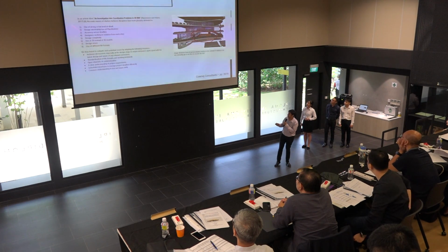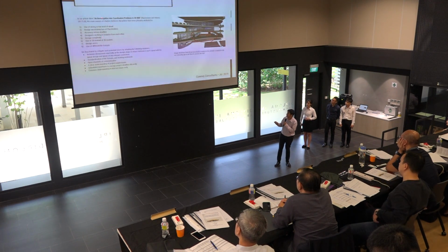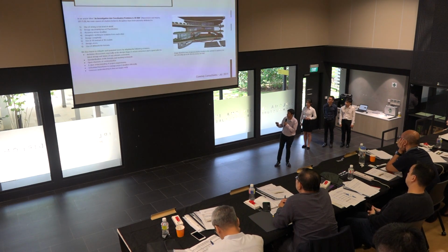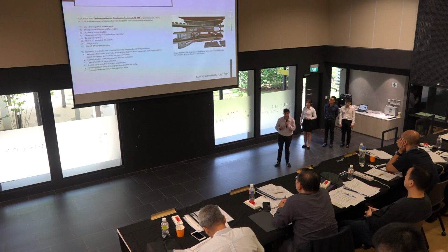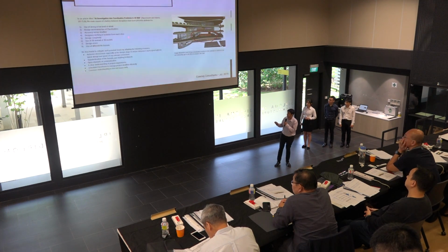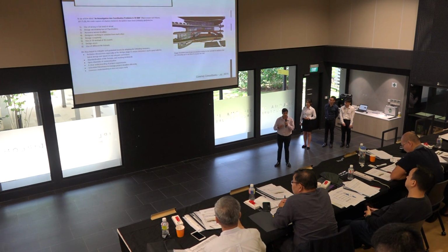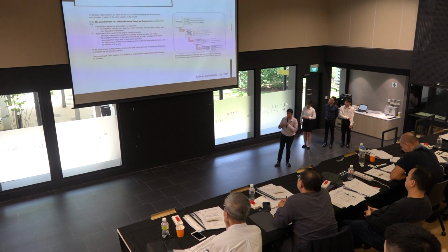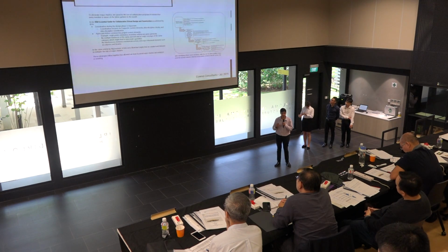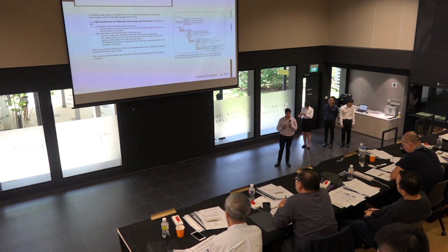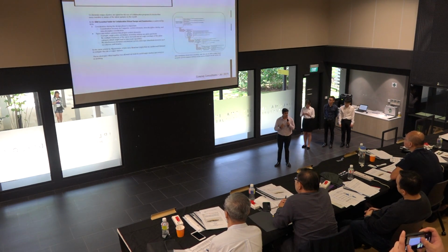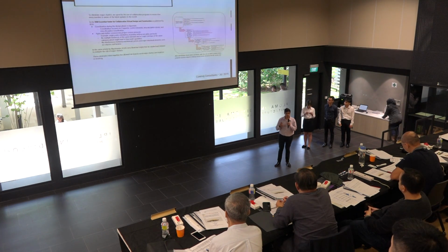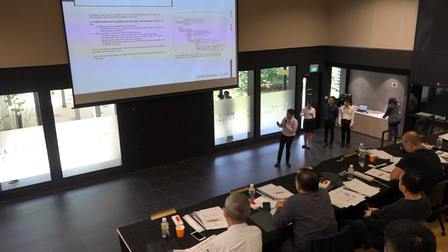This is an example of design clashes, as in a 2017 study, which attributed them to using 2Ds instead of 3Ds, and also design errors. We looked through this study, and we tried to implement ways whereby we can reduce design clashes in our project. What we did was take a collaborative approach where we do interdisciplinary checks, and we also define certain key elements such as the origin, orientation, boundary, grids, and levels.